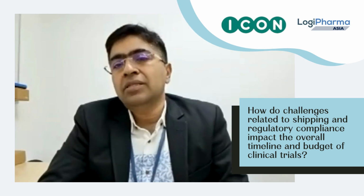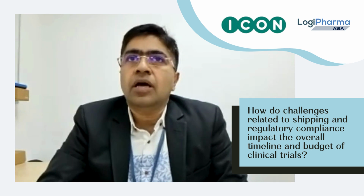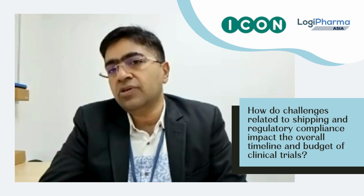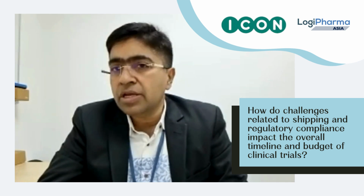That's a very good question, actually, because the timelines and the budget are quite strongly interlinked. And these challenges may impact a trial at various stages. Suppose they hit at the very early startup stage of the trial, and your site activation or startup of the trial is delayed. Every single day's delay in starting the trial has significant cost implications,